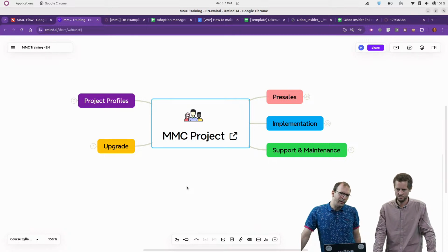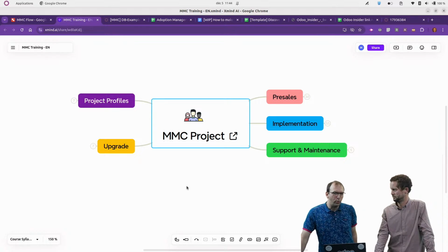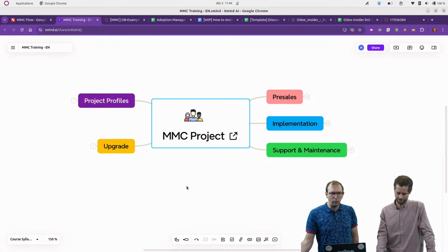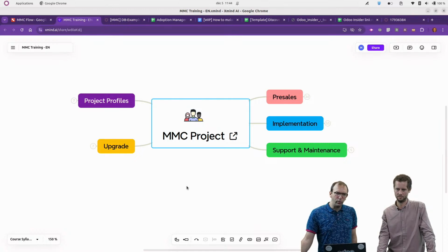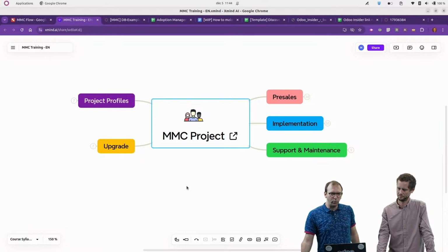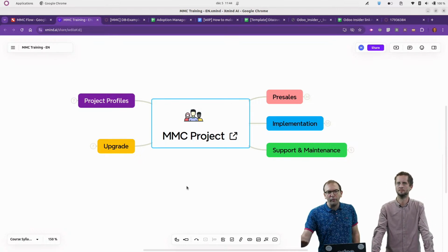What I had once seen is that, to make sure it would not happen, the application they were using before was moved into read-only mode after the transition to Odoo, so that technically it was not possible to keep using it. But of course, you have to make sure those things are well communicated, and for me that is part of change management, to do your best to avoid those kinds of situations. But indeed, it can happen, and when it happens, you have to take the appropriate actions.